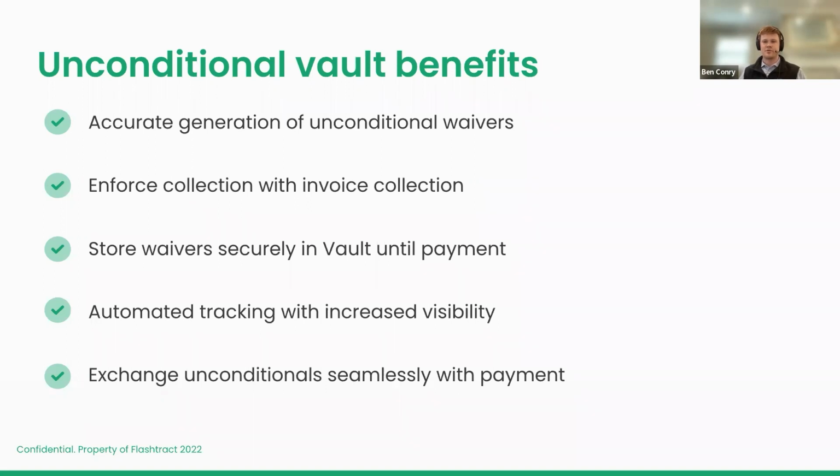So this is going to provide a way for your subcontractors to securely sign these unconditional waivers upfront when they go to submit an invoice, but you as the general contractor will not have access to the official copy until they have actually received payment. So it's going to provide for a more seamless exchange of funds and documents. We're also going to provide automated tracking. You'll be able to report on this information, see where the unconditional waiver is in the process. Has it been released from escrow? Is it still in escrow? And you can see this in a matter of 2 clicks in our system.